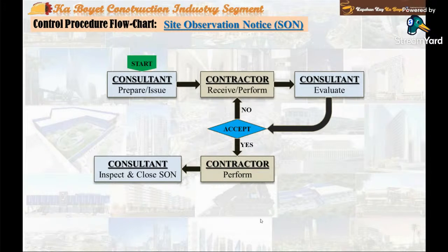further back jobs. Second, the contractor, within 24 hours upon receipt of the formal SON, submits an SOM proposed contractor disposition. And thirdly, it is in the consultant's, or the project architect, engineer, or designer's discretion if any outstanding open SON will be converted into an NCR, or a non-conformance report.